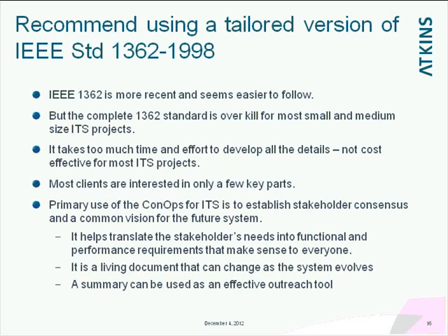It's important that the ConOps get a lot of feedback, and if you write a ConOps and then you have a concept review with the stakeholders, like a workshop, and if everybody's quiet during the ConOps review, you have failed miserably. You have to have a very interactive, spirited discussion among the stakeholders and let them work out among themselves what it is that they all will agree on and what they want the system to do. And